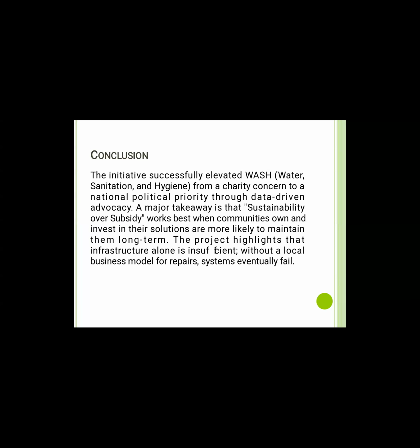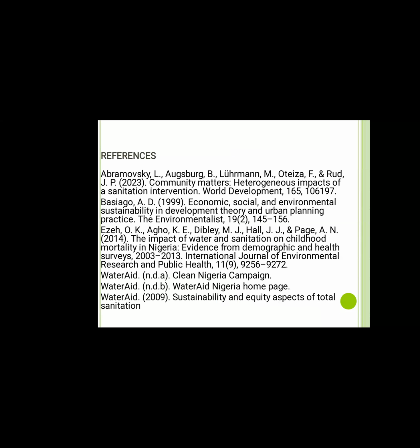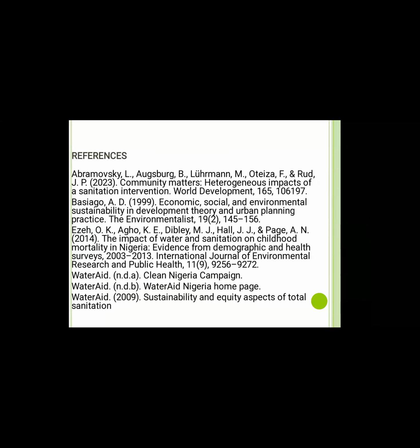Then conclusion. The initiative successfully elevated WASH, water, sanitation, and hygiene, from a charity concern to a national political priority through data-driven advocacy. A major takeaway is that sustainability over subsidy works best when communities own and invest in their solutions, and are more likely to maintain them long-term. The project highlights that infrastructure alone is insufficient. Without a local business model for repairs, systems eventually fail. Next, please. Then we have our references. Thank you.